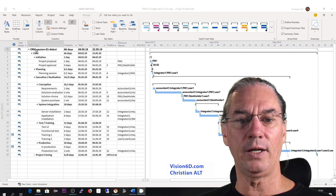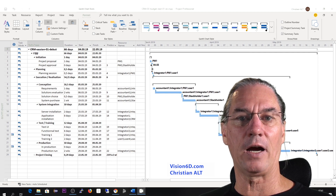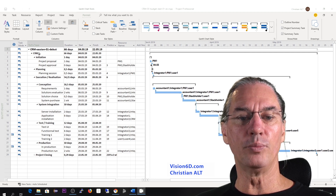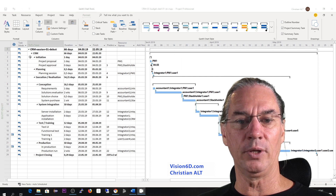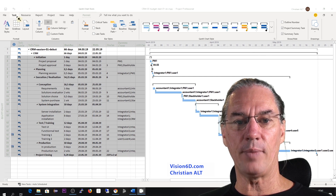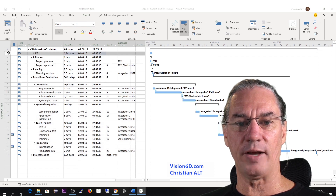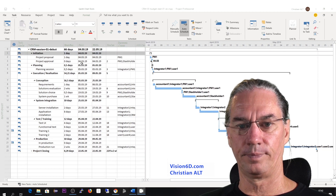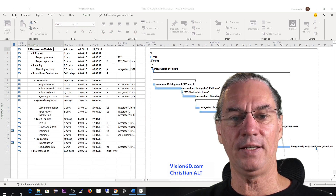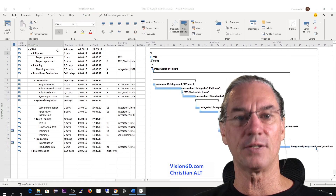In the case of our file, we have a doubling because we have a CRM session here, which is a task, and CRM down, which is also a task meant to summarize. I will remove the task called CRM. In order to do that, I select all the other tasks and bring them up one level. Like that, I can simply remove the task CRM, and I have the summary task as required by MS Project, keeping it named CRM.